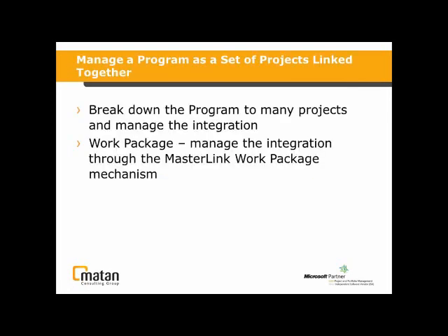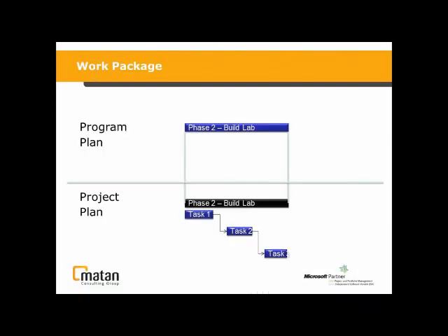Another kind of dependency that we have in here is the work package dependency. And that means, at the program level, all I'm interested in is knowing when phase 2 of building the lab starts, when it finishes, and if I have an issue, do I have any raised flags here in the program. On the other hand, the project manager that is focusing on building the lab of this huge hospital, part of the program, needs to really detail out phase 2 of building the lab.